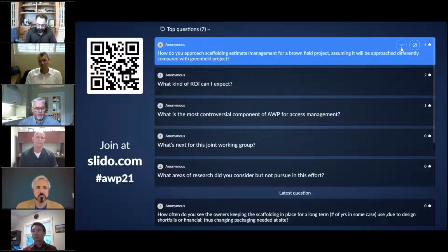Certainly there are. One of the things that we have to plan for is the unplanned more on brownfield, because your teams often discover activities that you didn't anticipate quite often, right? Whether it's in an outage or a brownfield project or whatever it may be. So we sort of plan for the unplanned, and we have a standard process, and we certainly rely on WorkFace planning approaches for the access. And the more leeway we get, the more we can think strategically about those individual WorkFace planning items, if that makes sense.